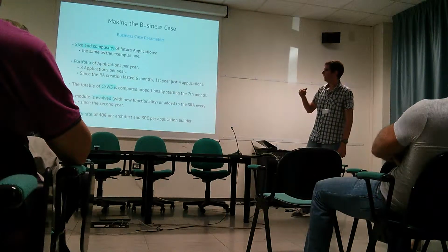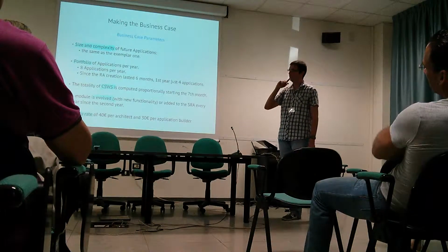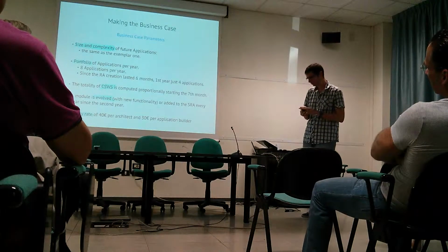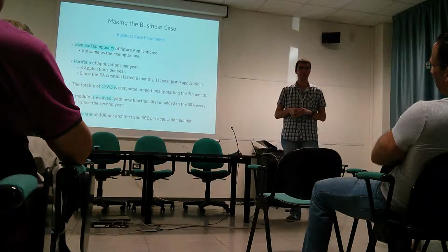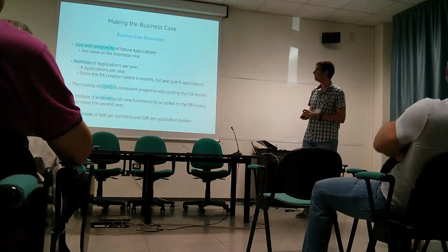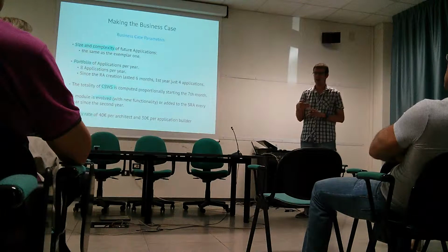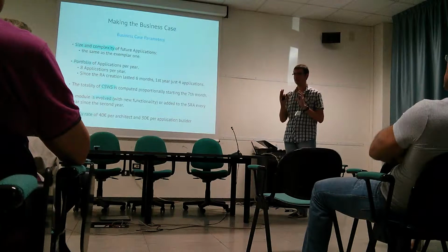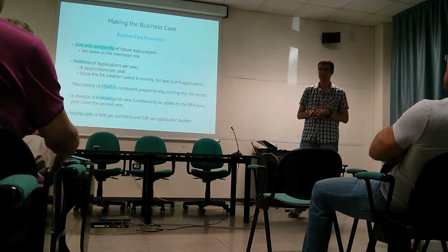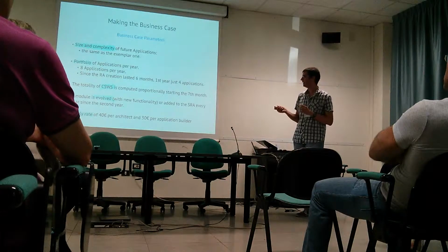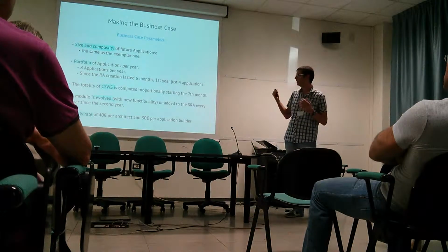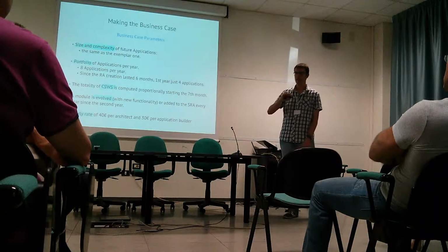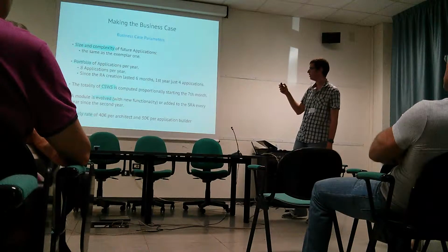So now we need to create the base case parameters. The first one is the size and complexity of future applications. Since they already developed one application, we assume that all applications will have the same complexity and size as this one, although it's not the best case. The portfolio of applications per year, we assume in the roadmap they plan to create 8 applications per year.